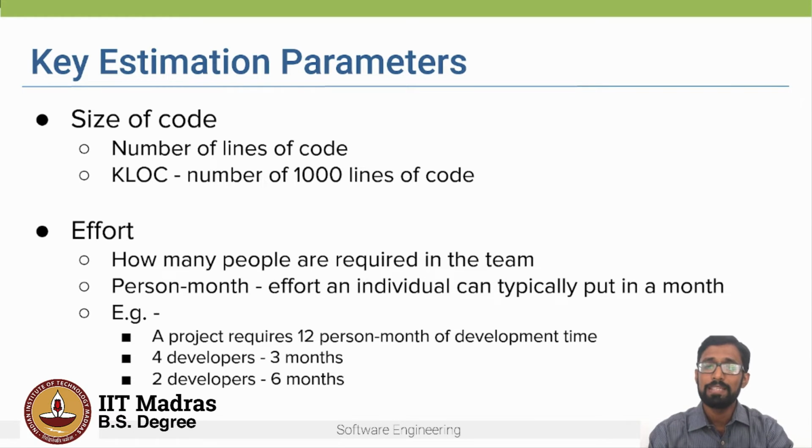You might think it is better to think in terms of total hours. How many hours does the entire project take? But work is often expressed in person-month units because it is easier to get a feel for how many people might be needed to finish the development work in a fixed time.